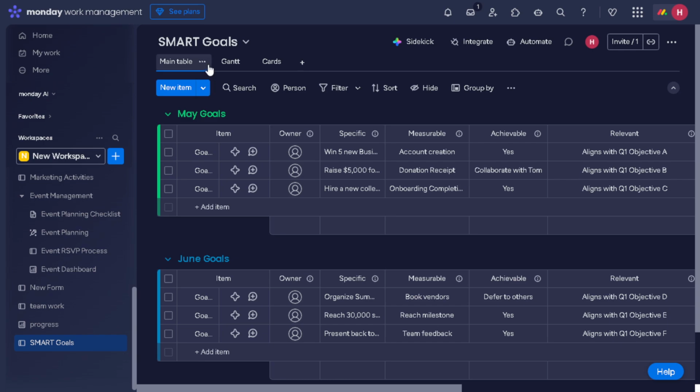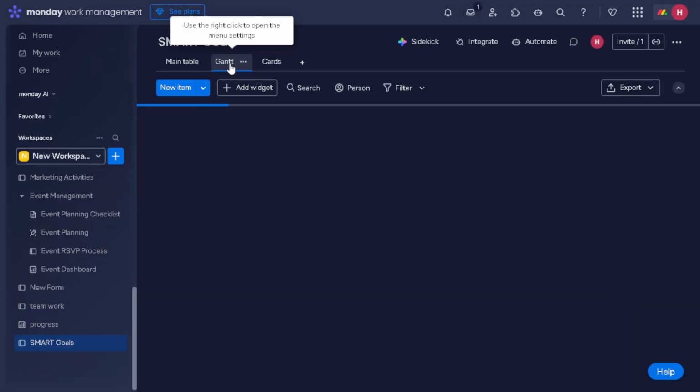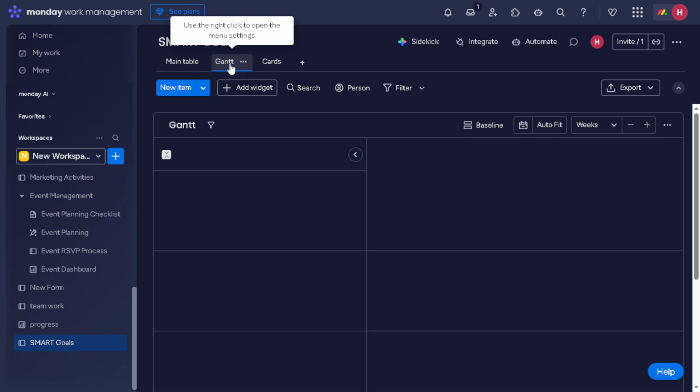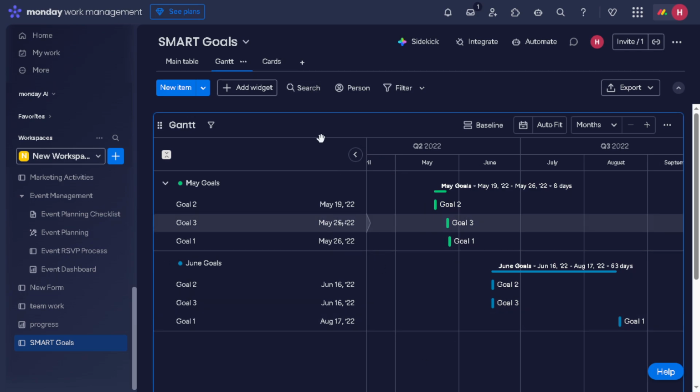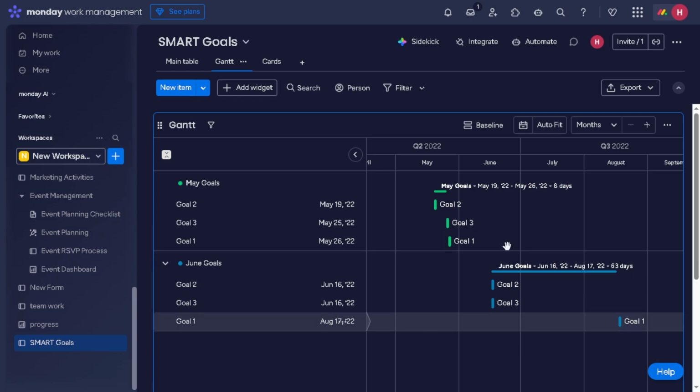Next, you'll want to set phases and alignment for each initiative. Move across the columns and select the project phase that corresponds to your initiative, then indicate if the goal is currently active. Additionally, choose which strategic objective each goal aligns with. This helps in ensuring everything you're planning ties back to your larger strategy.